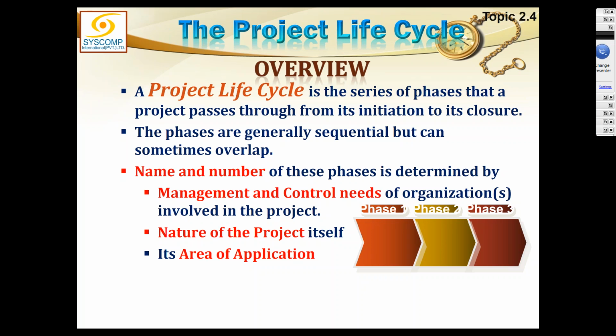You see, if you have to construct a 2-story building and one story is one phase and the other story is the second phase, you are supposed to take a clearance after phase 1, get its approval, payment and everything, and then move on to phase 2. But the people who have to give you the approval say, well, we don't have time, we are busy, we can't give you the approval right now, so please start phase 2 and we will ultimately give you the approval.